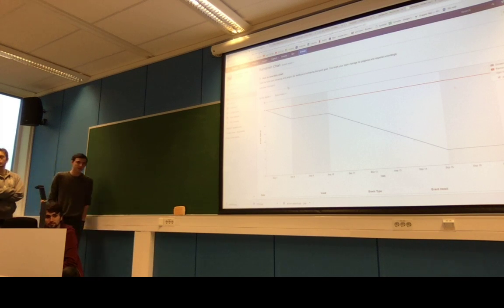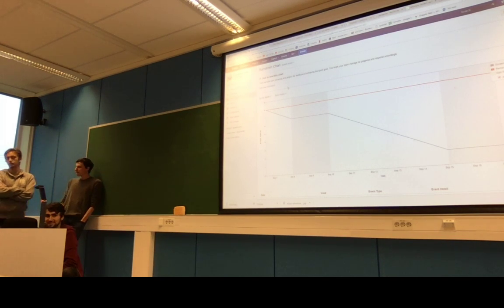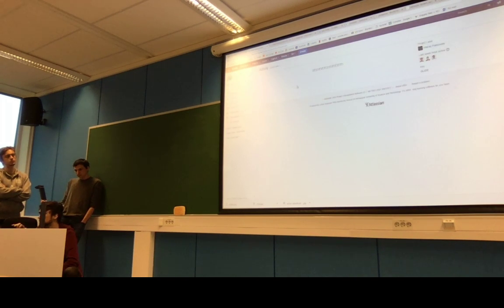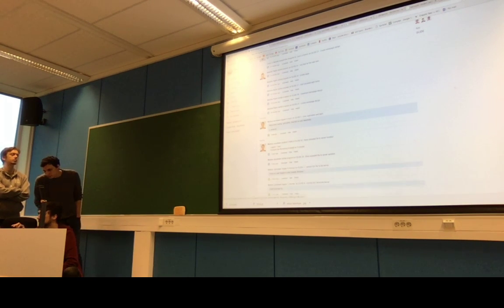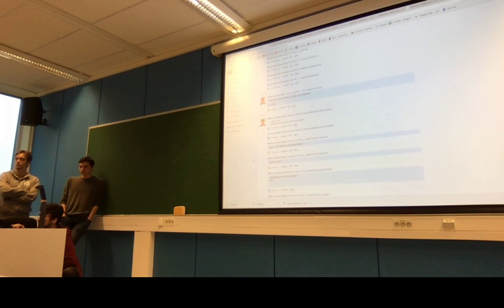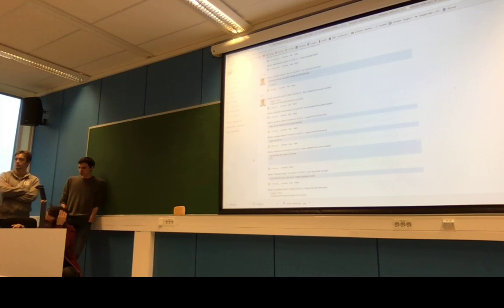But now it works for you guys, right? The smart commits. For me at least, yes. There is a delay, but it works. If you just press the sprint, you can see the smart commits processing. So our smart commits work, and they parse correctly. My main issue is that the keywords aren't documented in Jira well enough, so I missed some transition keys and stuff like that. I see, like in progress isn't start progress. So I've learned to roll back commits and edit the commit message.